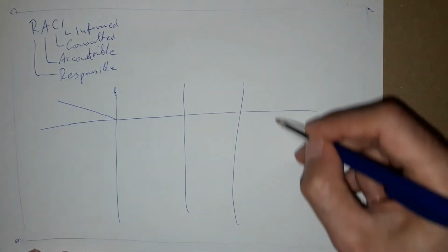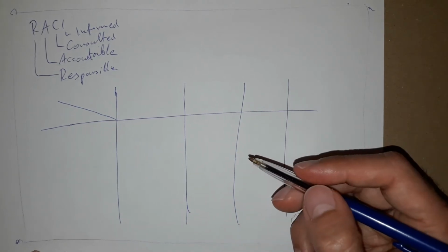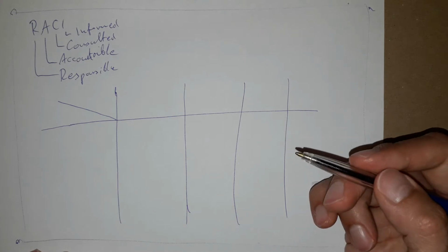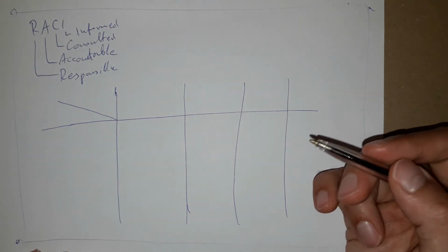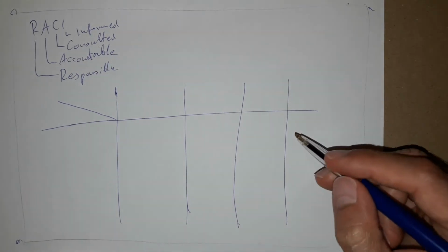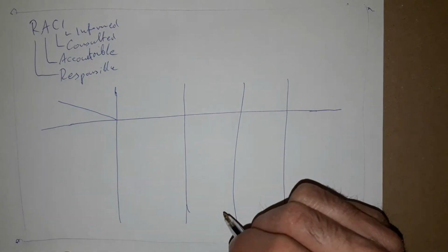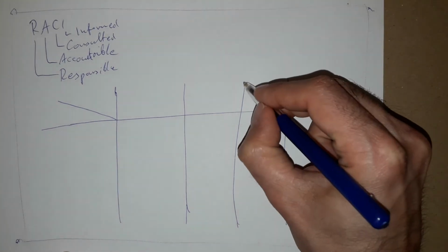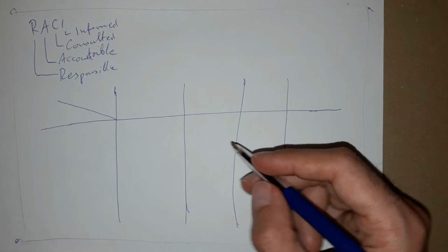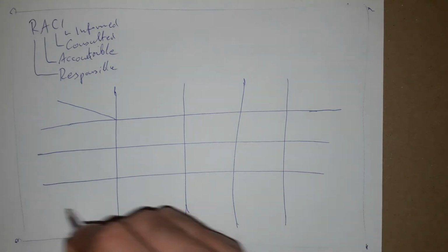And actually, who is responsible to do a job, who would be accountable for that job, who needs to be informed that the job is done, and for example, who is doing some additional or supporting tasks that can help to do the job. So let me put a very simple table here.